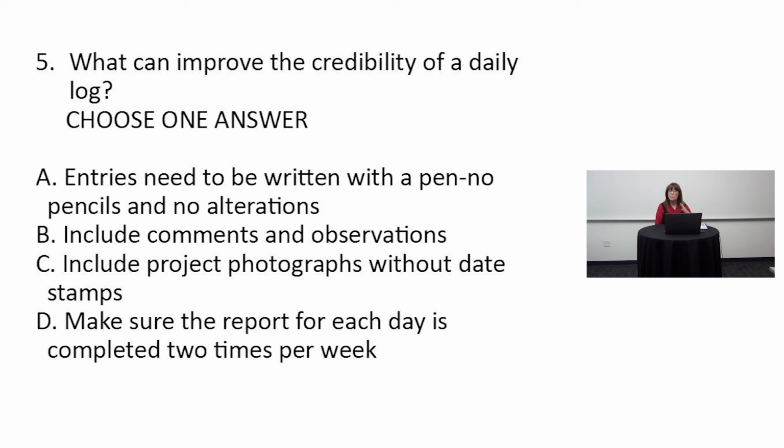Okay, number 5. What can improve the credibility, the trustworthiness of a daily log? Answer A, entries need to be written with a pen. No pencils and no alterations. Now, if you saw a daily log and it was erased and crossed out and tons of changes were made to it, how could you rely on that? So it's got to be written in pen, no pencils, and no alterations.